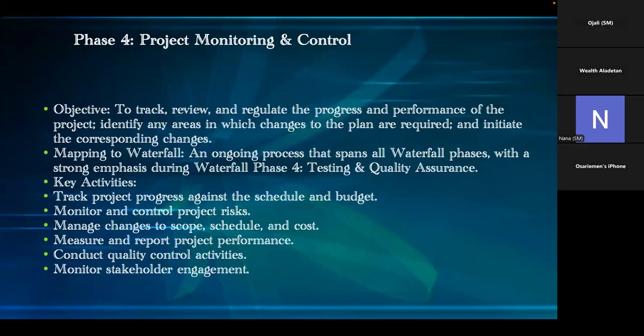If required, you can have some project where you're doing it sequentially in phases, and at the same time, in each phase you want to bring in agile because you will now be having daily stand-ups. You'll now be having maybe a short sprint. It may not be the normal 2-week sprint. At times they might just decide to have a 1-week sprint, or they might not use Scrum. They might want to use Kanban.